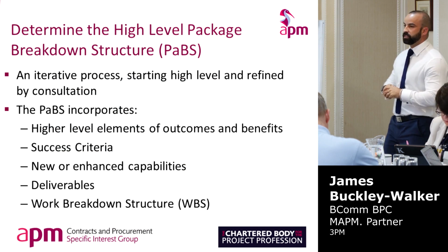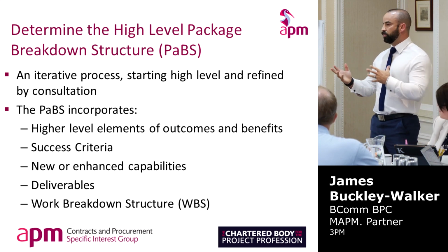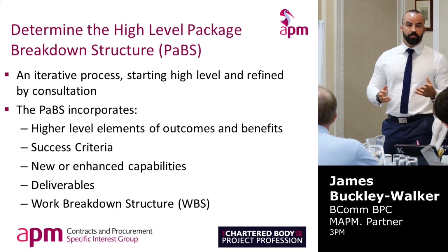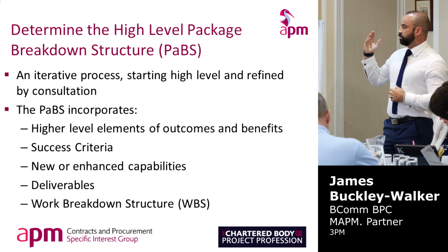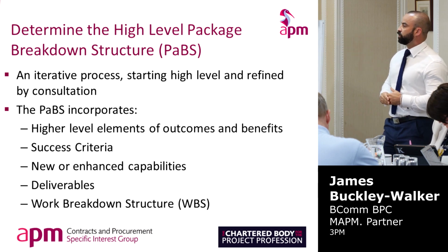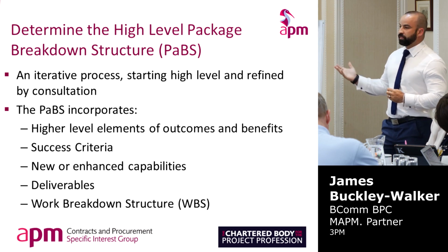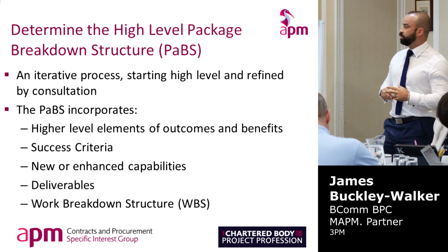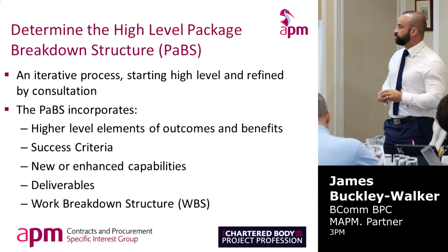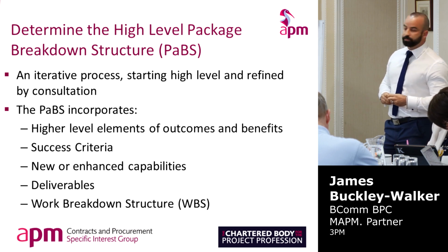So what we want to do is we start off very high level. We want to refine it and look at it by consultation with the project team and with the client and with the market as well as we go along. So the package breakdown structure does incorporate those 5 levels that John was talking about before, the elements of the outcomes and the benefits to the project, success criteria, what are these capacities and the capabilities that the project is going to provide to the client, and the deliverables for each, the goods and the services, and then the work breakdown structure from that.